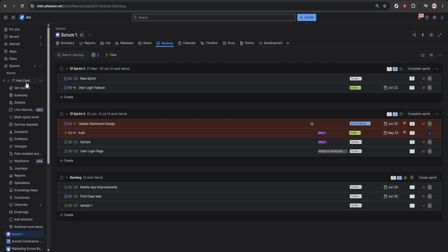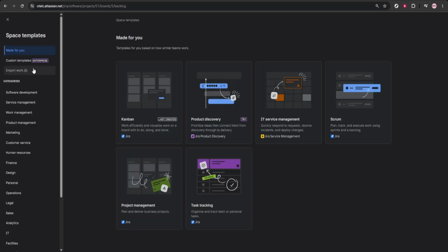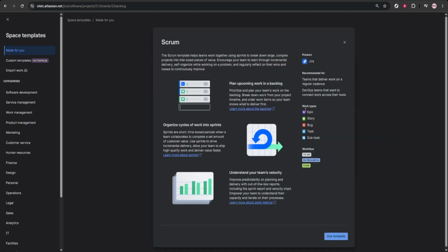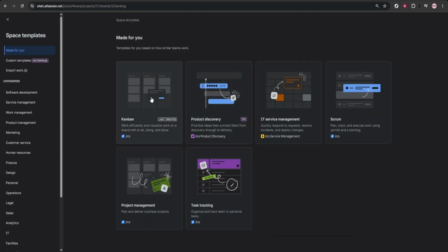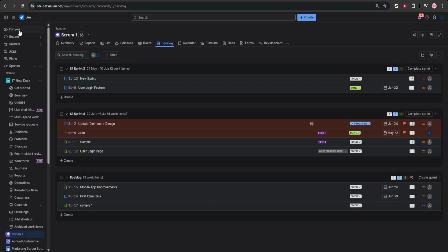Start by setting up your Jira projects. After you log in, create projects that reflect your SAFe structure. At the team level, this usually means separate projects for individual Scrum or Kanban teams. At the program level, create projects for features and shared delivery work that involve multiple teams. At the portfolio level, set up projects for larger business goals and strategic initiatives. As you create these projects, choose Scrum or Kanban templates based on how each team actually works. This is important because the right template makes boards, backlogs, and reporting much easier to use.